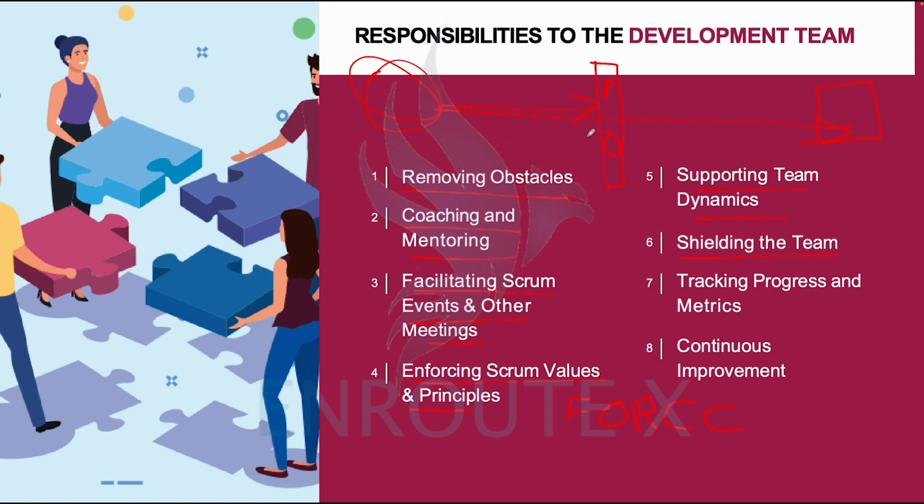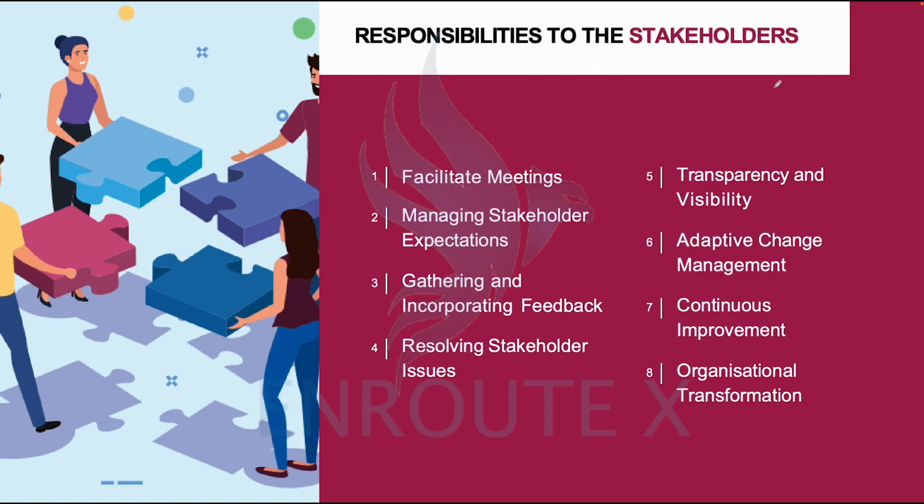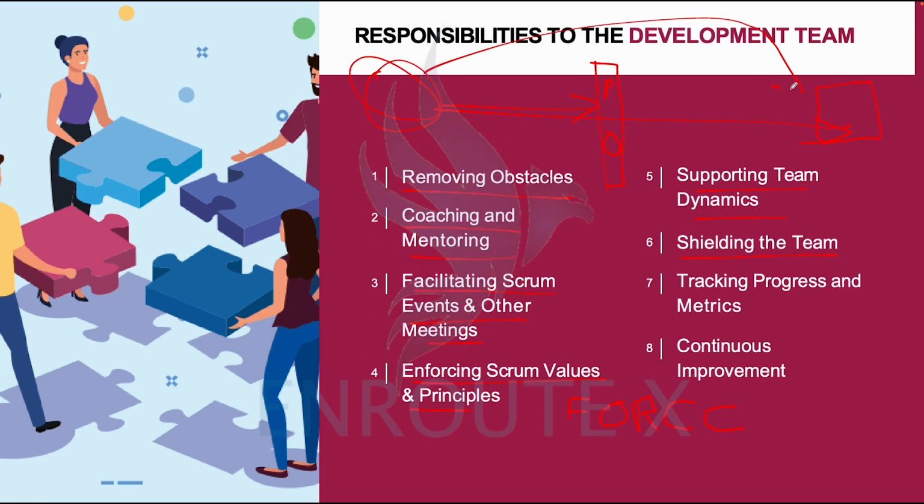Where the Scrum Master observes that some of these stakeholders are beginning to send work items directly to the developers, that means some troubles are coming for the team, because the team will begin to lose focus. The team will begin to have so many tasks outside what they can see, and it will begin to impact their delivery.